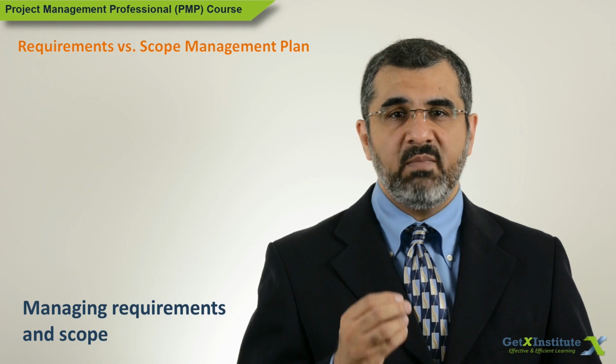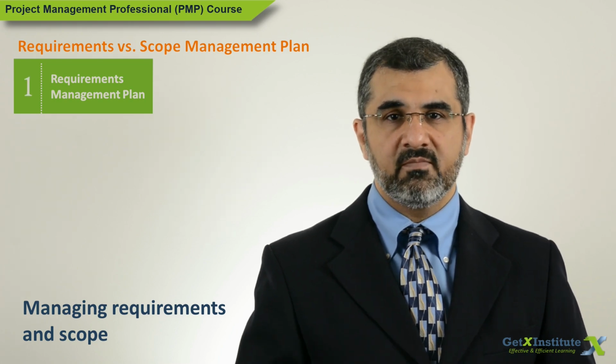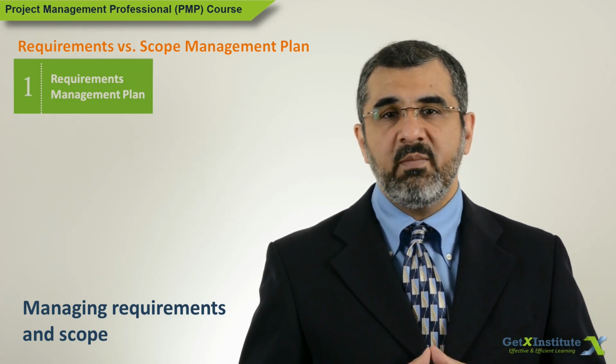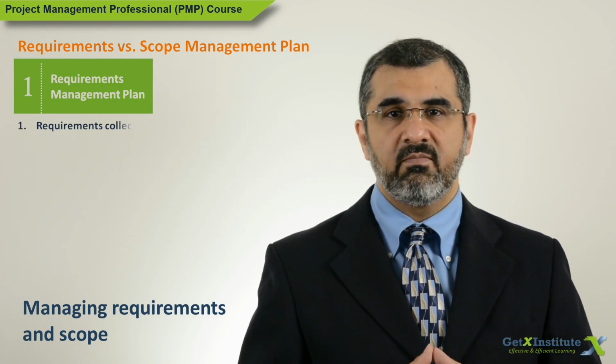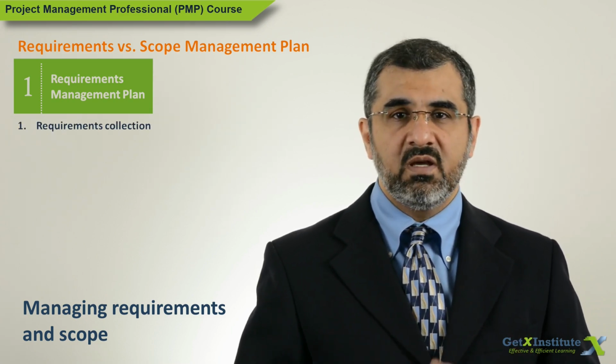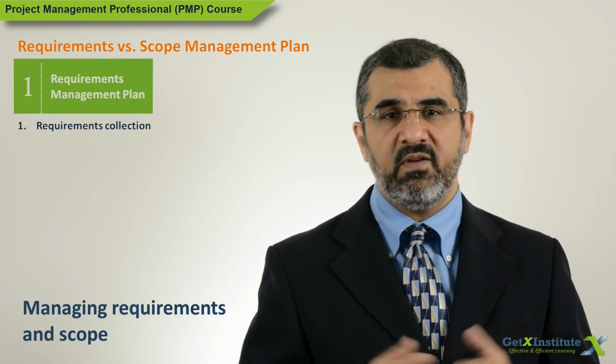The requirements management plan will have the following details. Requirements collection. How the requirements will be collected from stakeholders or otherwise. For example, interviews, focus groups, document reviews, and interface analysis.